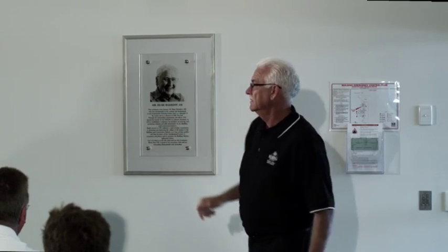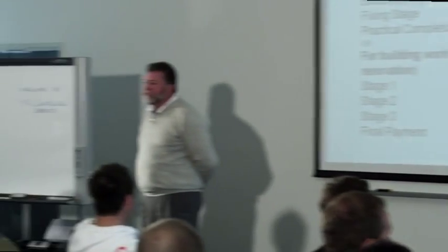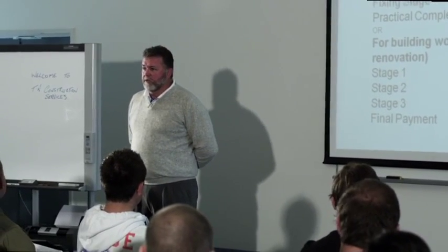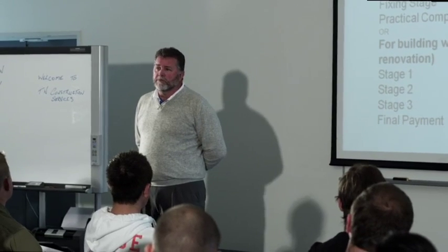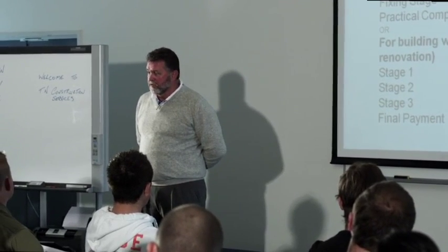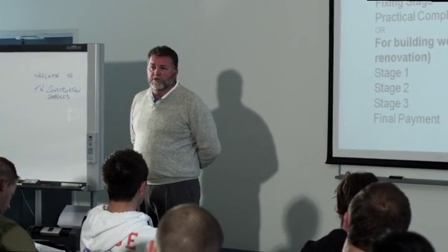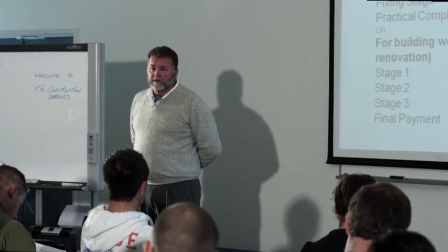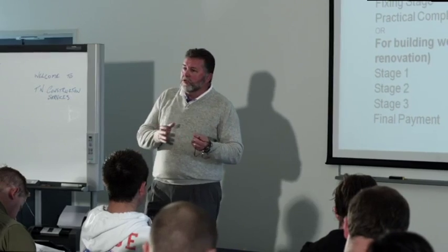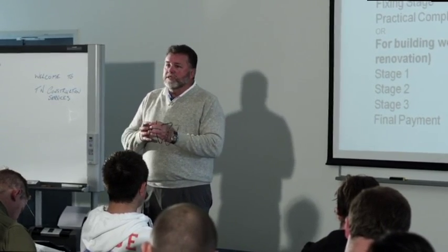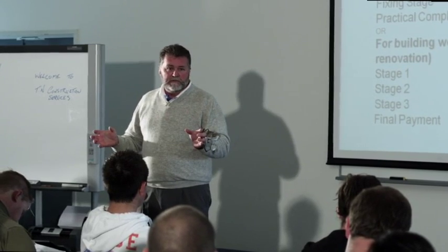If that's the hardest one you're going to give me today. Guys, the easiest answer to that question is this. If you have something that requires to be done previously to the main works, you can actually look at doing a payment in your special conditions. Not using method B, but look at you making a special condition within the contract. And in actual fact, if you have a situation where you do have a pool in relation to a house, my advice is to actually split the animals.